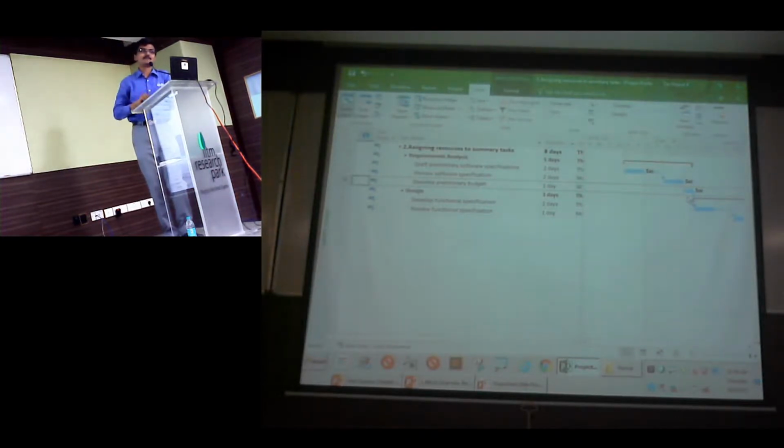Or can you change the duration from days to hours? Yeah. That will solve the problem. You can, but his requirement is, if you change it from days to hours, still finally it is minutes only, right? When he's saying 4 hours in 1 day, 4 hours in one task, 4 hours in another task. Correct. So instead of tracking on the basis of days, it's tracking on the basis of hours. But still, finally, if you look at the way the dates are scheduled, it is at more of a minute level. So if you look at the first task, though it is 4 hours or 0.5 days or even 1 day, it is still from morning 8 to evening 6.